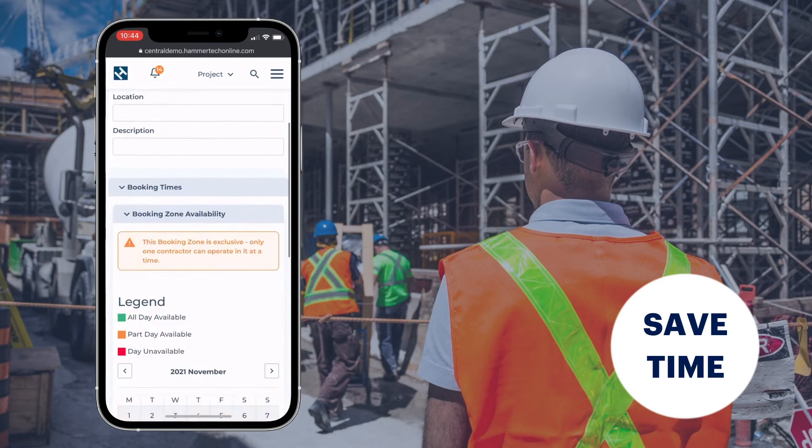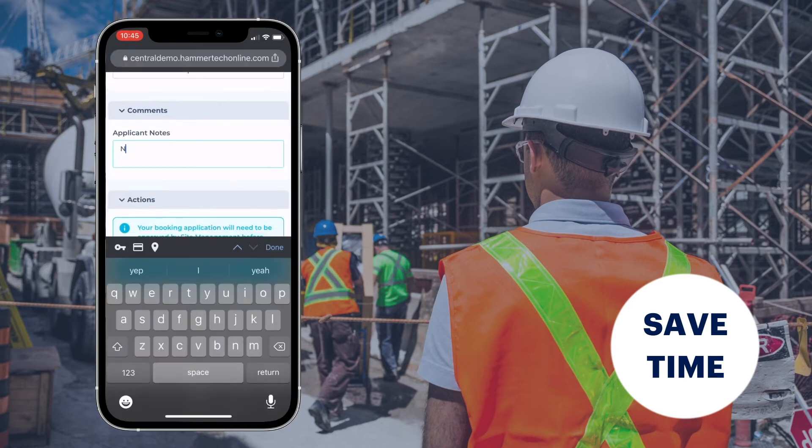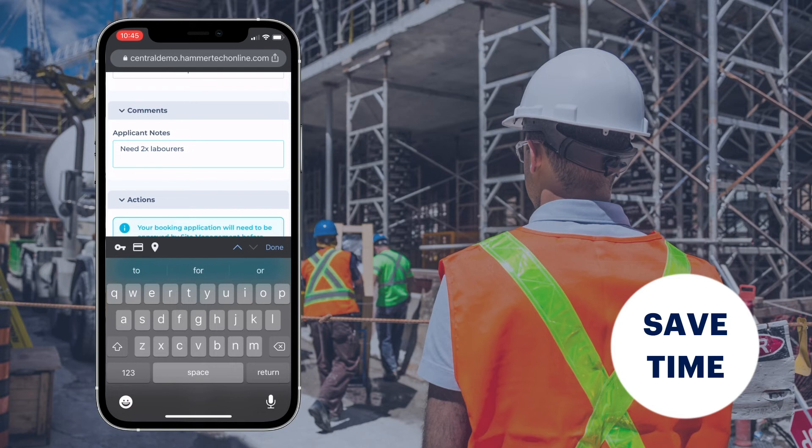Avoid last minute bookings with optional cutoff times. Compare planned bookings to actual deliveries to monitor utilization and find efficiencies.